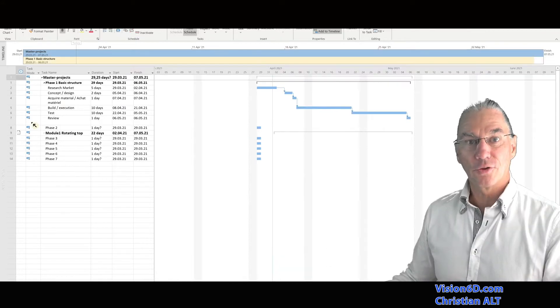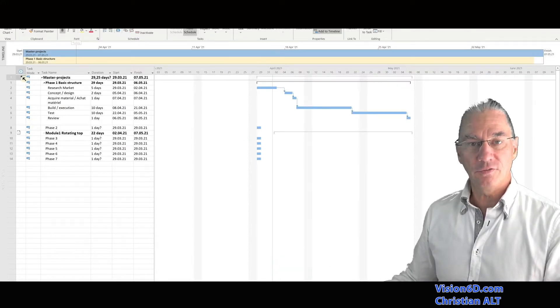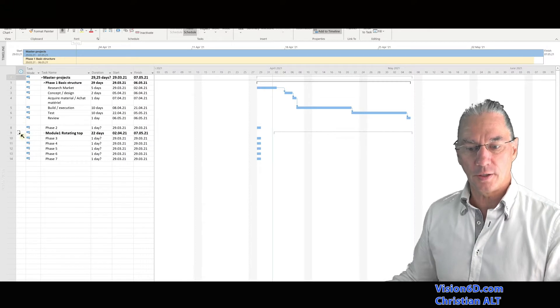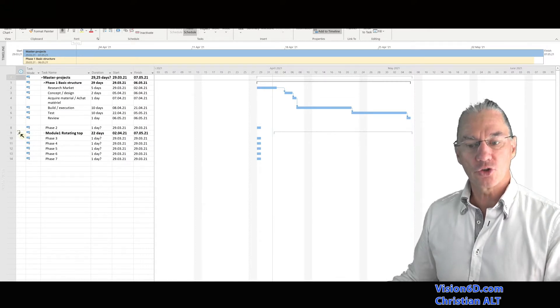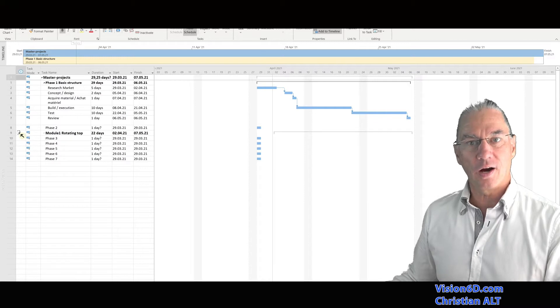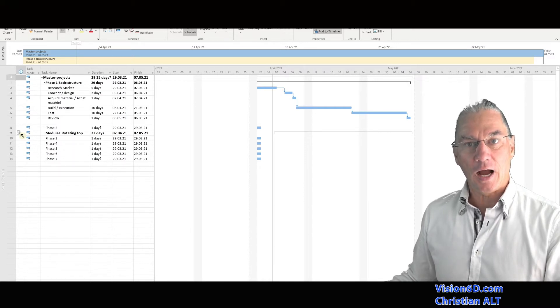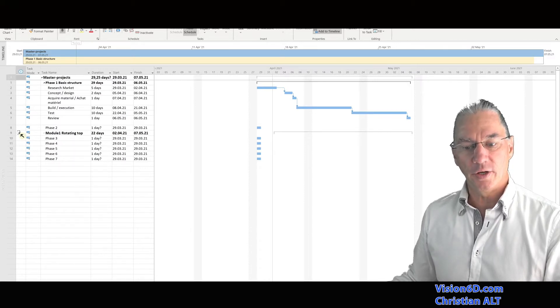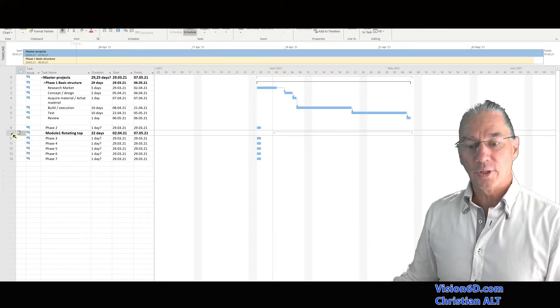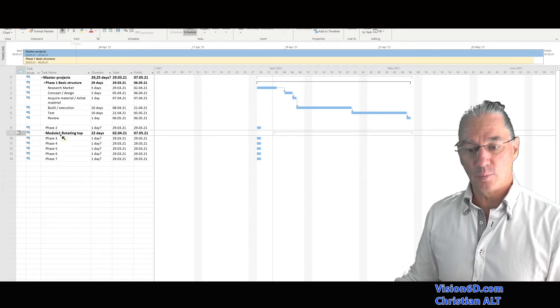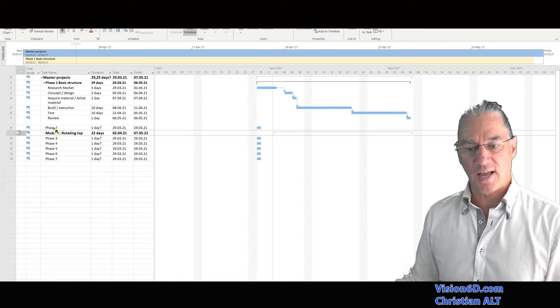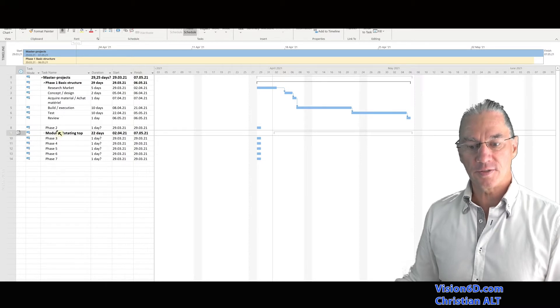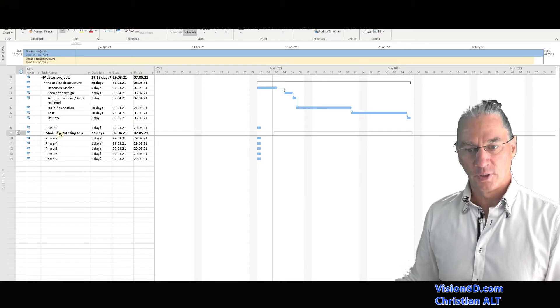The first thing we see in the information column is a new icon we have here, which shows us that we are linking our current file to an external file. We have task nine, which is the module one rotating top, which comes after phase two. But in fact, it is part of phase two.